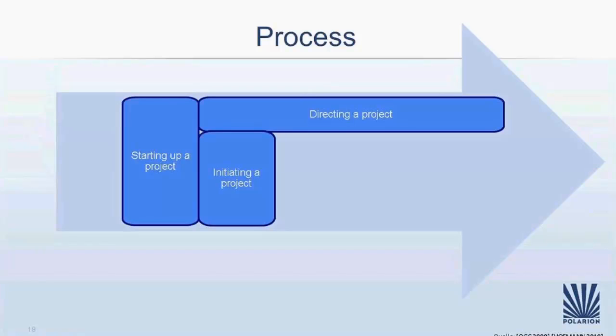You will define a risk management strategy, a quality management strategy, and also define the business case much better. When you started a project, you just had, for example, maybe an idea how to make something better in your company or for a customer. And then you define it in much more detail when you're initiating the project.